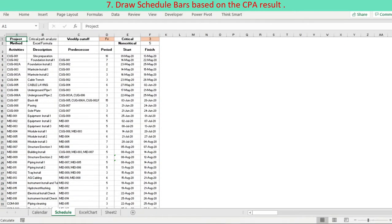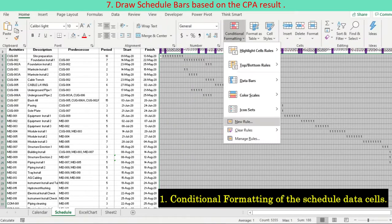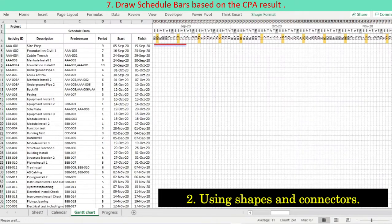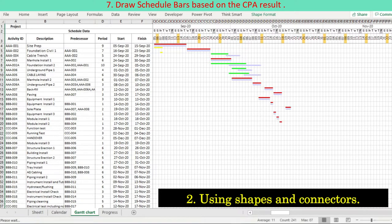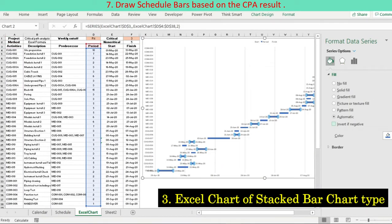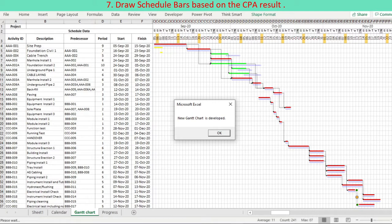The critical activities are highlighted using conditional formatting, constituting the longest project path. Now we can draw schedule bars and dependency relationships based on the result of critical path analysis. Three methods are available: the first method fills schedule cells with a chosen color using conditional formatting; the second method draws schedule bars using shapes such as rectangles, starting at the cell corresponding to the start date with length corresponding to the period, and displays dependencies with connectors; the third method displays schedule bars using an Excel stacked bar chart. Only the second method, using Excel shapes, caters for relationships, while the other two methods show schedule bars only.